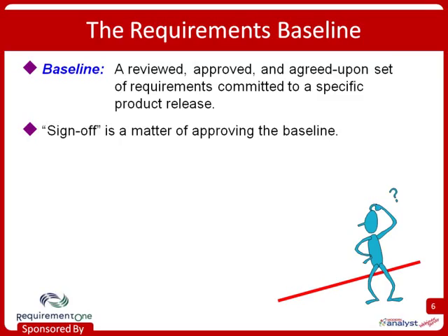And here's the part nobody likes, because I also would say I realize that approved changes might require us to renegotiate the cost, schedule, and resource commitments for this project. Everybody wants change to be free, and the fact is change is never free. And everybody has to understand that, and it doesn't matter whether you like it or not, that's just the way it is. Even the activity of discussing a proposed change and then deciding not to do it is not free.